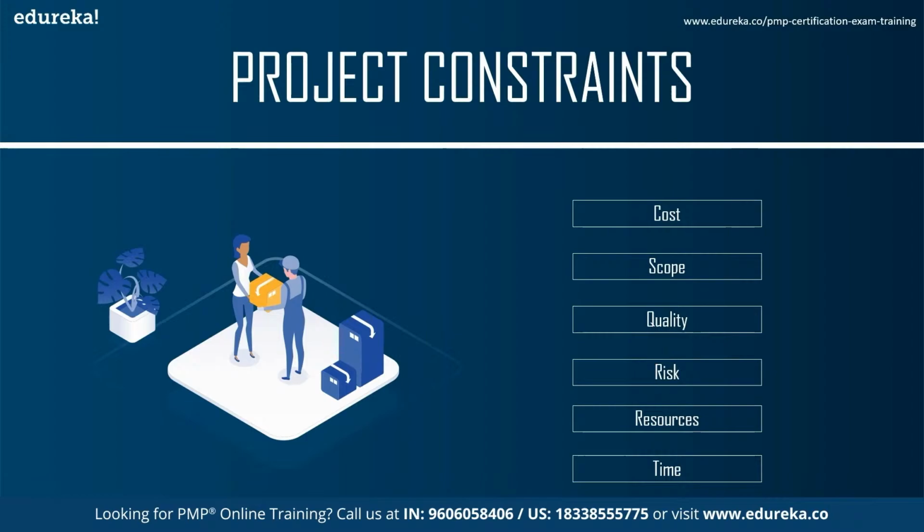Finally, the most important constraint is time. Time is obviously defined as the time period allocated to you to complete the project. Time is often the most frequent project oversight in developing projects. This is reflected in missed deadlines and incomplete deliverables. Proper control of the schedule requires the careful identification of tasks to be performed and accurate estimations of the durations, the sequence in which they're going to be done, and how people and other resources are to be allocated. Any schedule should take into account vacations and holidays.